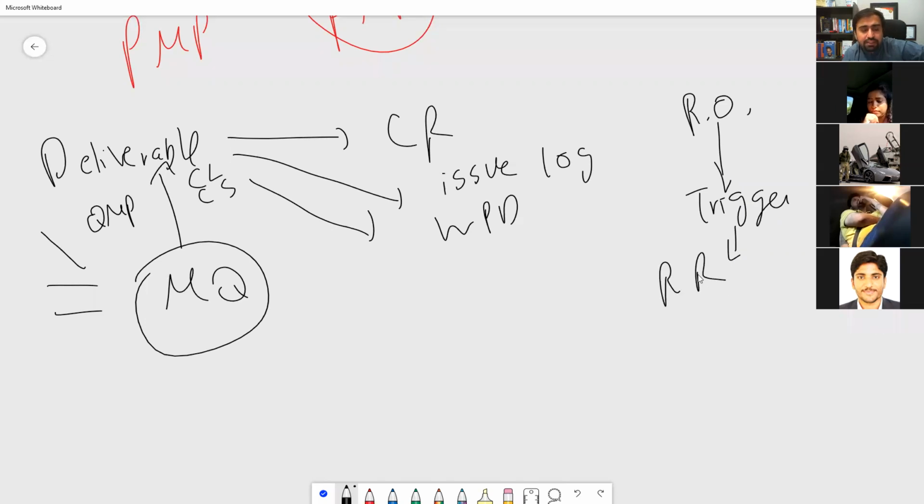Once he implements the risk response, there are two options: either you will have residual risk, or you will have secondary risk. Residual risk is a remaining risk, mostly accepted. Secondary risk is more like another risk has occurred, so you make a plan for that, just like a primary risk. So in execution, everything is happening and all the information is being produced.